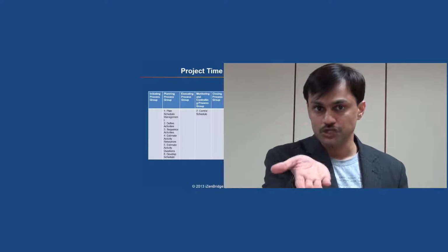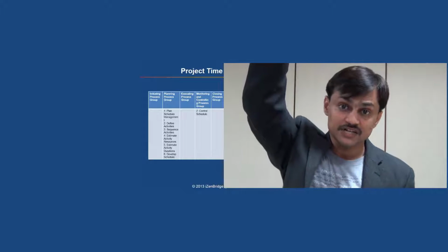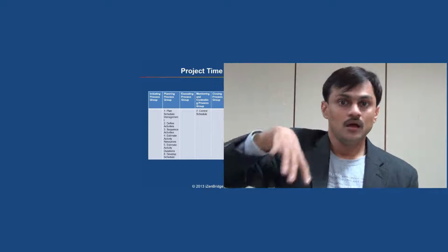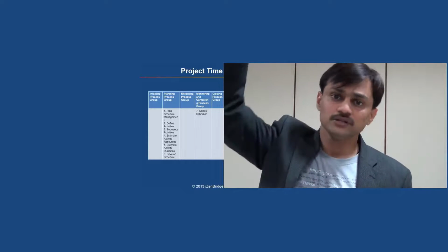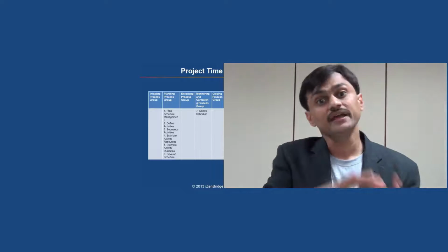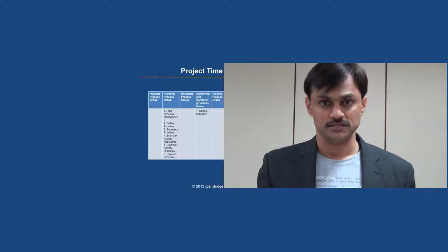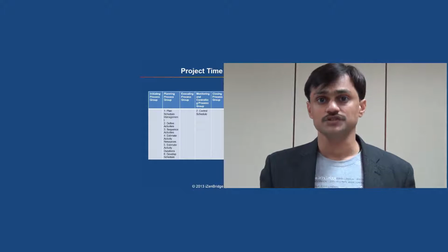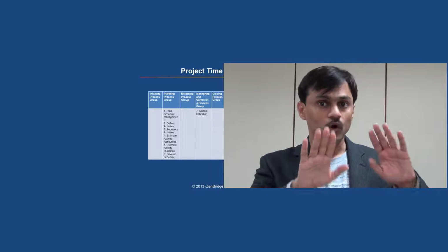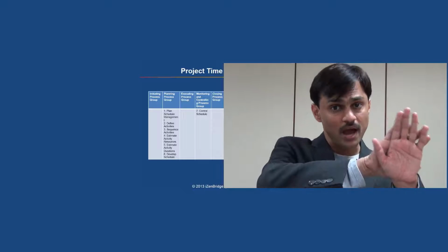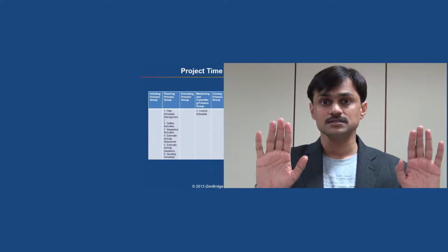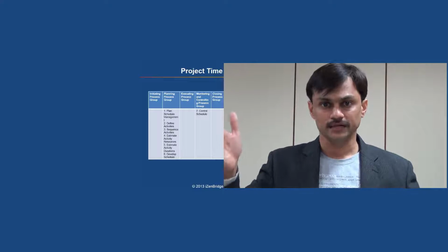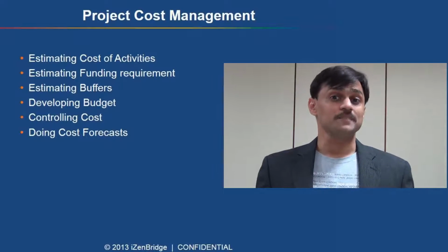Because here we get a schedule which will go back to the project integration management knowledge area and will become part of the project management plan. After doing this planning, execution will happen in coordination with project integration management. We get to the control schedule process, a process under the monitoring and controlling process group, responsible for identifying the variances between the plan and the execution, giving us an important trigger to help control our project in a given time frame. Project cost management.